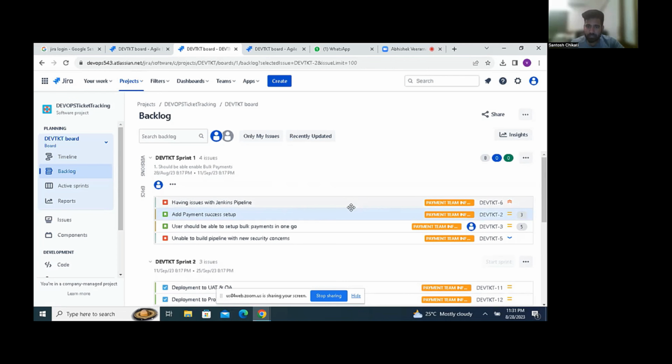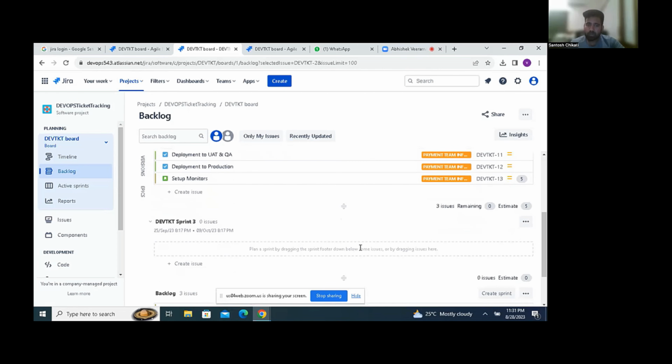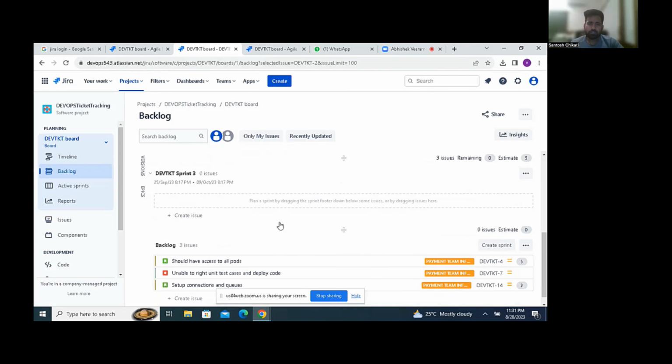They can directly put stories in the sprint, do the backlog refinement and the planning at the end of the day, and start. Or else, if they are not comfortable, they can create one dummy sprint called backlog refinement. They can put the user stories here, because there are like 500 or 1000, and even for the product owner it might be difficult. So just for his tracking, he can create one sprint called backlog refined, or refined stories, whatever name the team is comfortable with, and put those user stories here.